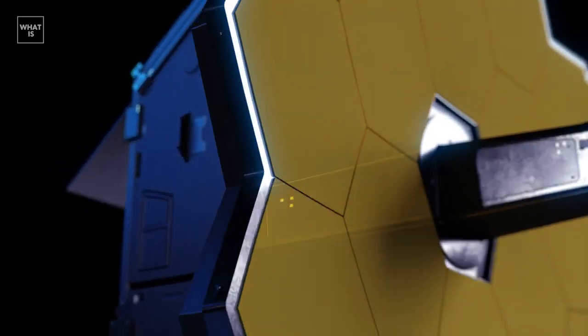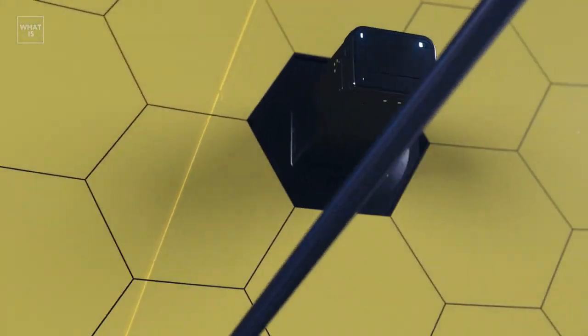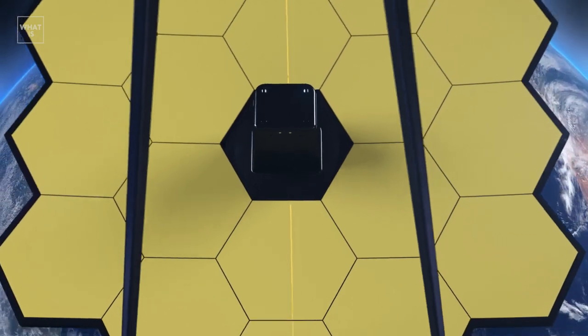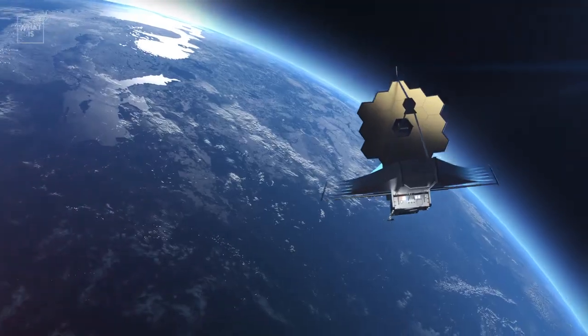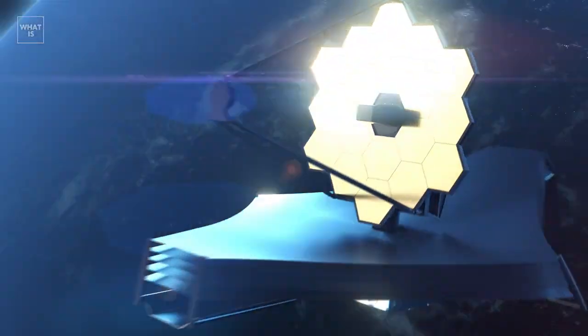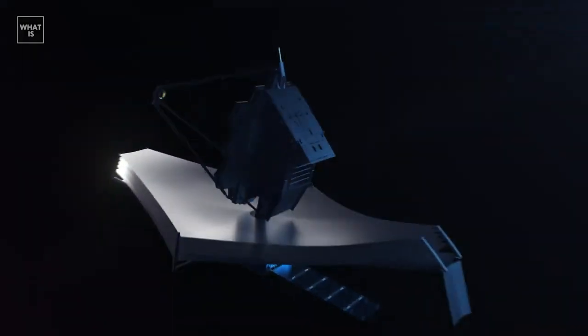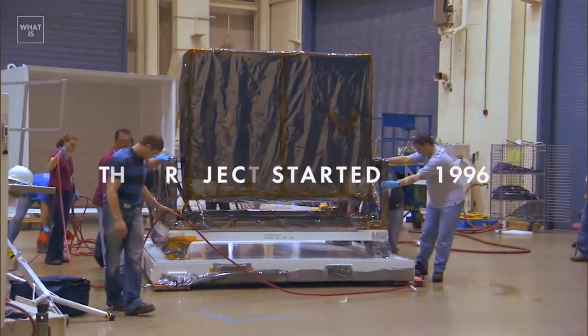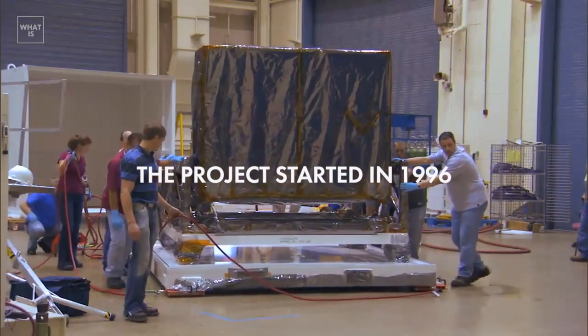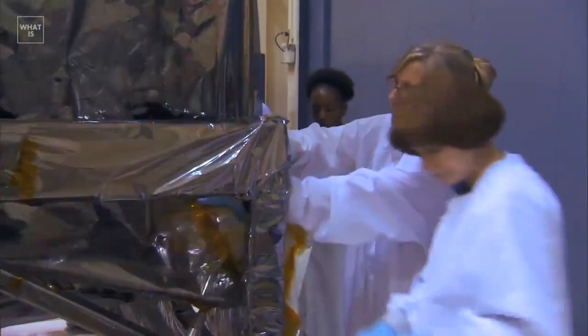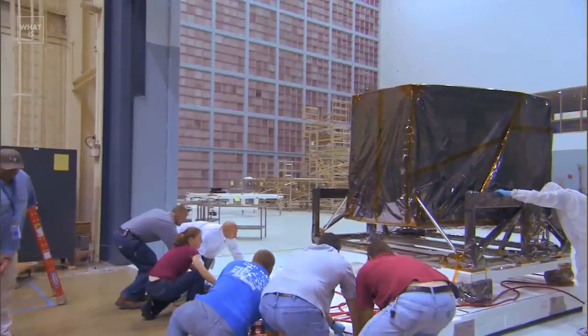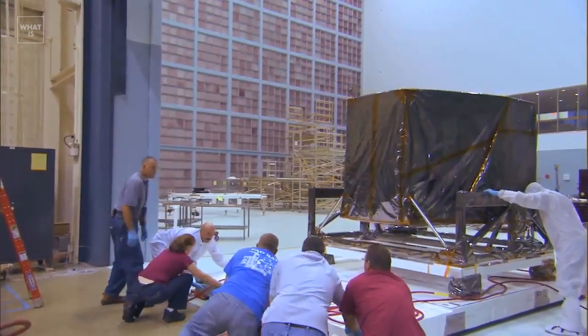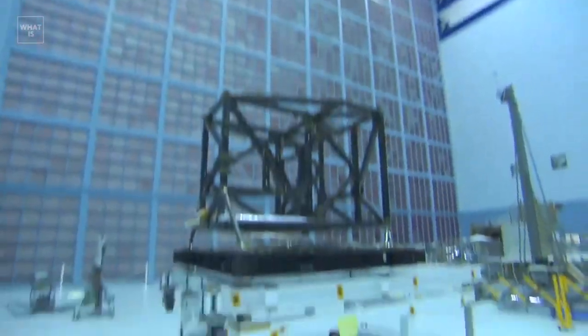The James Webb Space Telescope has several advantages that no other existing or soon-to-be ground-based or space-based telescopes can match. James Webb itself has become a real long-term construction project and has been under the threat of closure more than once. The project started in 1996 and cost $12 billion by the time it was launched. Such terms and costs are determined by the highest complexity of the device and the requirements for design accuracy.